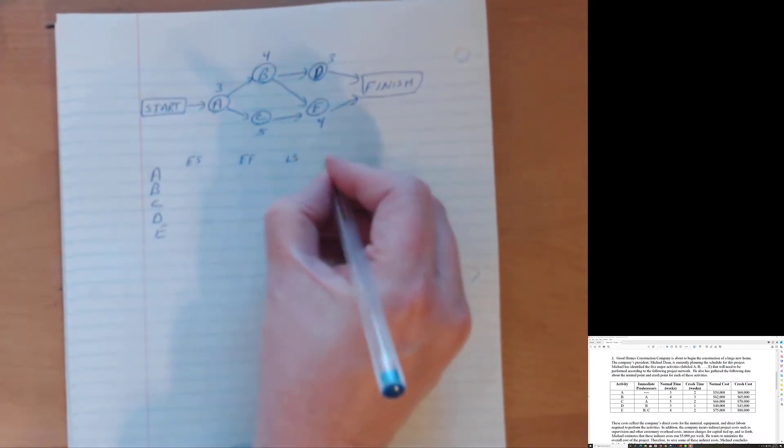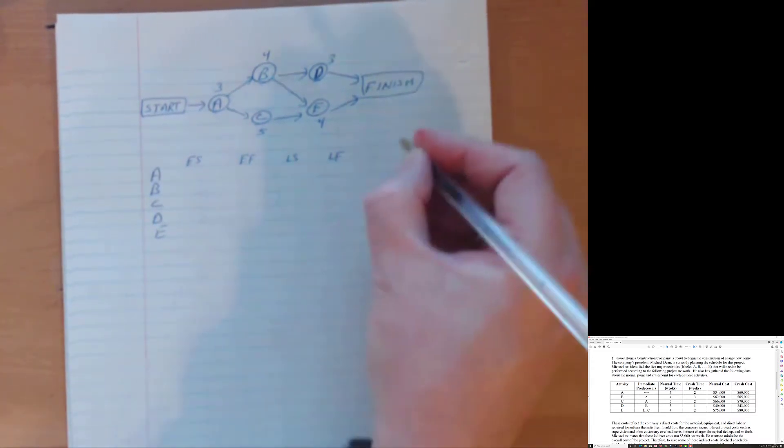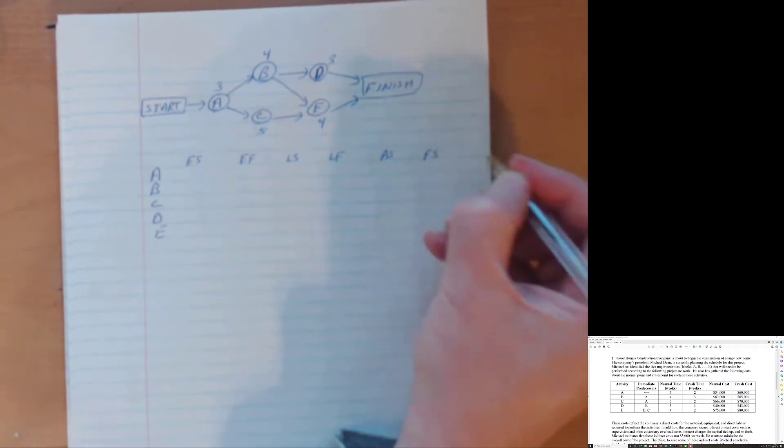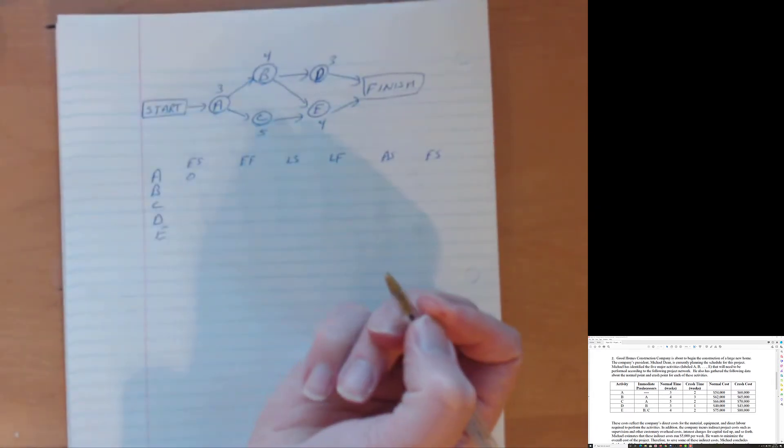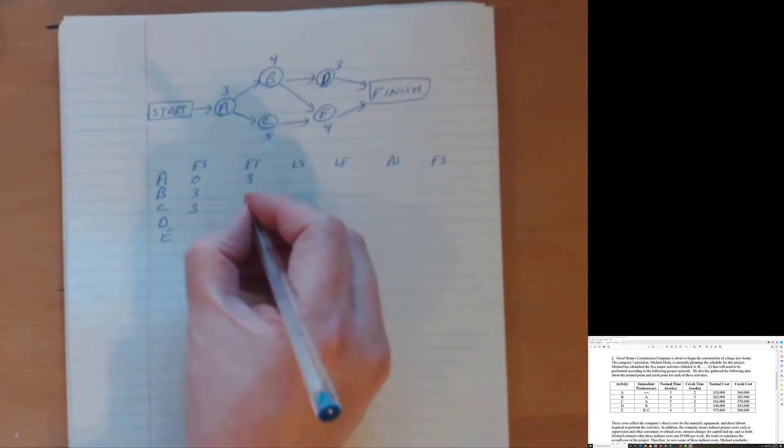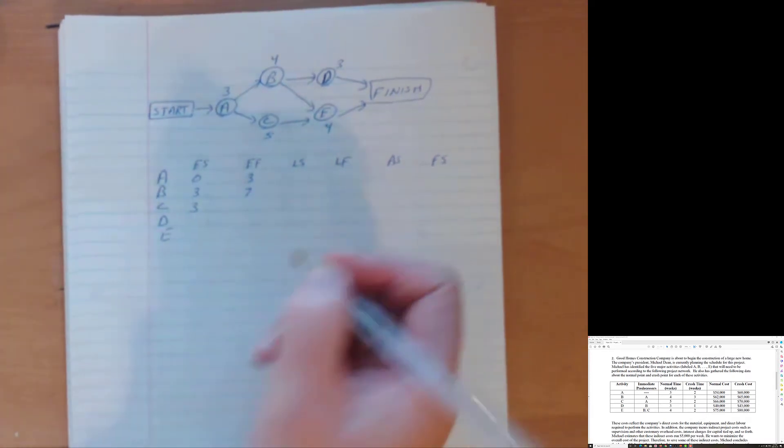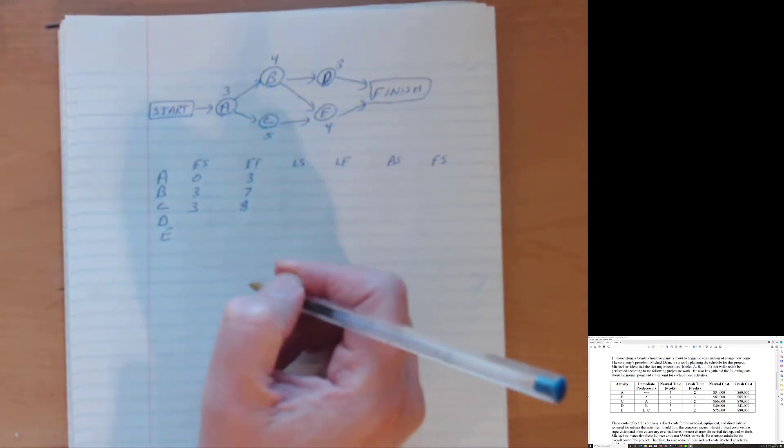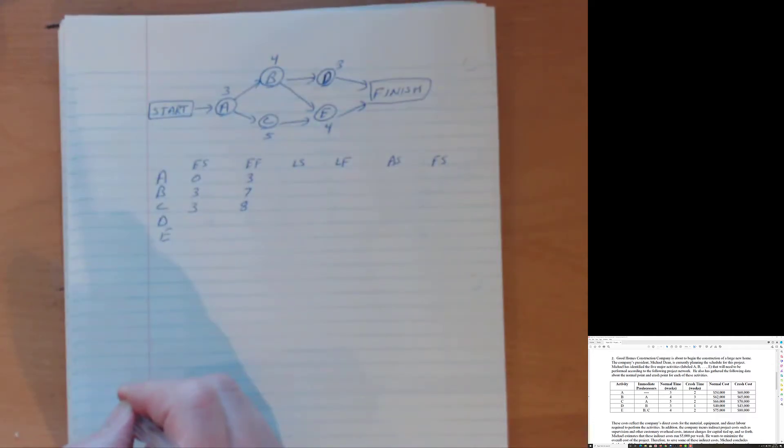And let's find the earliest start time, earliest finish time, latest start, latest finish, activity slack, and that demon slack, free slack. So A is the only beginning activity. So it starts at period zero. It takes three weeks, so it finishes at week three. B and C both depend on A. So B and C start when A is completed, which happens at week three. B takes four weeks, finishes up at week seven. C takes five weeks and so three plus five is eight and finishes up at week eight.